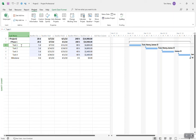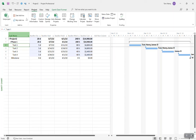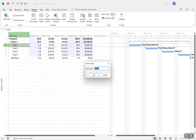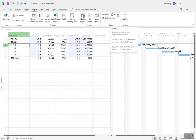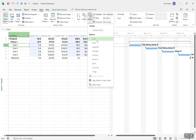Now we're ready to start the project. On a weekly basis, I'm going to come in and update progress. Our project is due to start on March 7th — we're going to pretend it's the end of that first week. I'll come into the Project ribbon and click Status Date, and set it to March 7th — Friday, the first week of the project. The status date is the date the information in the schedule is valid up to, so anyone looking knows when that data was gathered from the team.